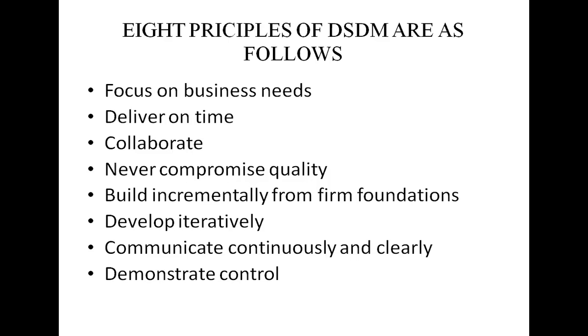Useful techniques such as time boxing and MoSCoW prioritization will help us know what the business needs delivered and when it needs it. By using techniques such as time boxing and MoSCoW: MoSCoW means must have, should have, could have, and won't have.